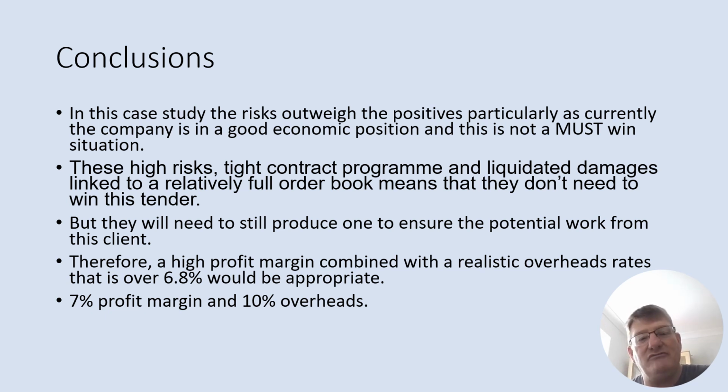So these high risks, tight contract program, high liquidated damages, linked to quite a full order book at the moment, mean they don't need to win this particular tender. However, they still need to produce one. You must make sure you say that if you come to that conclusion. So you've got future work with that client if you want it at another date.